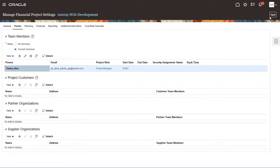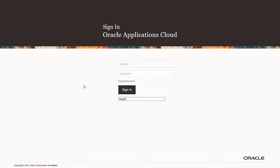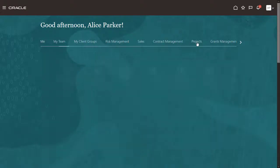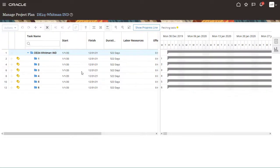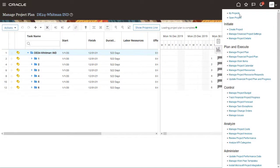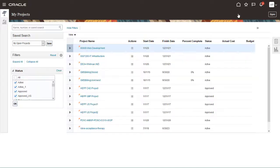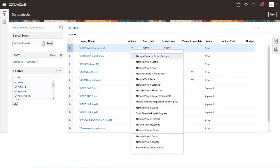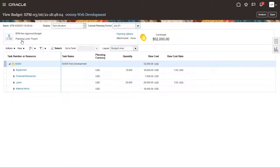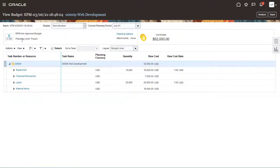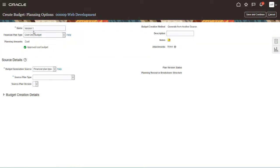Let's sign out as the administrator and sign back in as the project manager. Navigate to Project Management. Use the Tasks list to view a list of your projects and search for the project name. In the project actions, select Manage Project Budget. You can view the strategic budget from EPM Planning. Notice that all of the line items I entered in EPM Planning were imported.